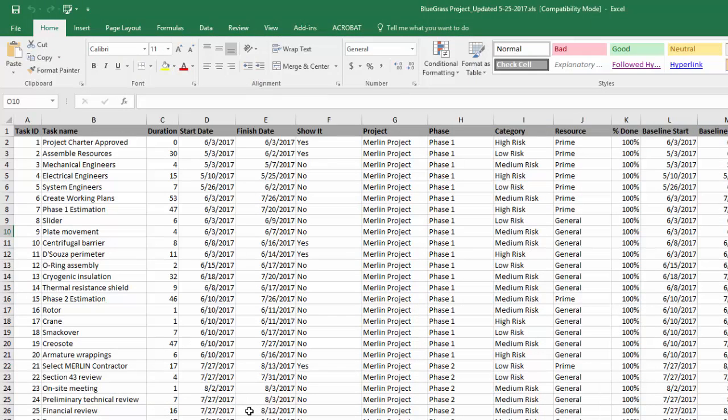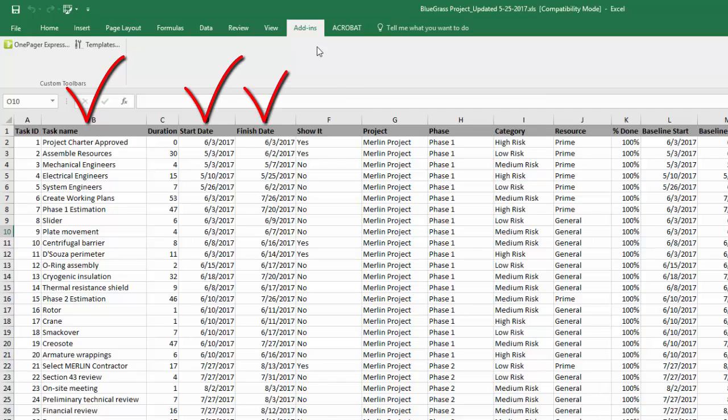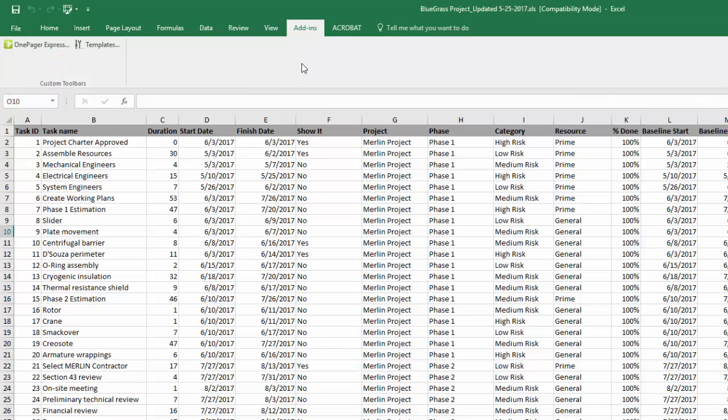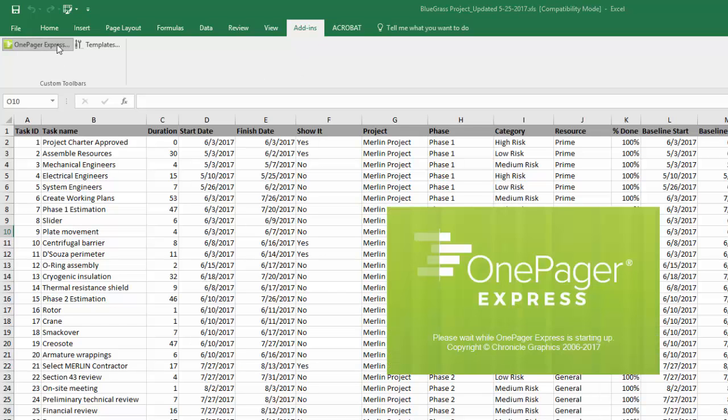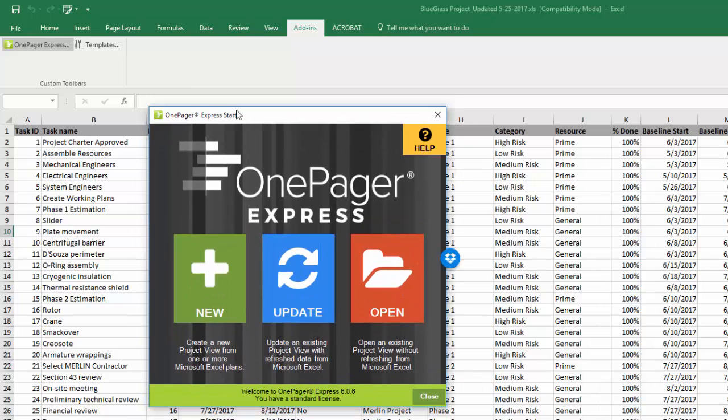Let me flip over to Excel and show you how this works there with OnePager Express. Express is not a trimmed down version of OnePager Pro as the name might suggest, it just works with Excel instead. The basic data you need in your source Excel file is also task name, start date, and finish date. A unique ID will help OnePager recognize each activity and milestone during updates, and a column with yes values will allow you to be selective about what you're pulling into your view.